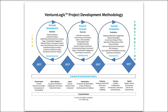The next step is proof of concept — that's fleshing it out — and your end goal is a completed feasibility study. One of the prime things that should happen, if at all possible, is identifying one or a couple of sites and doing an initial site assessment. Your project is actually not a project until there's a site, so without a specific site it may be difficult to convince people to provide funding or resources. Having a potential site with an initial site assessment helps quite a bit.